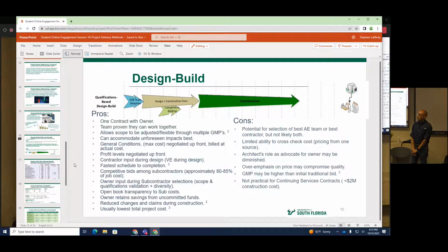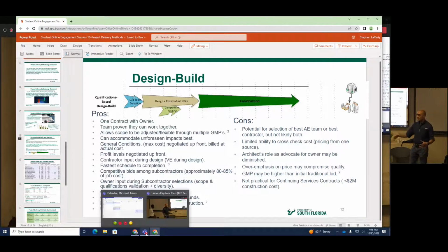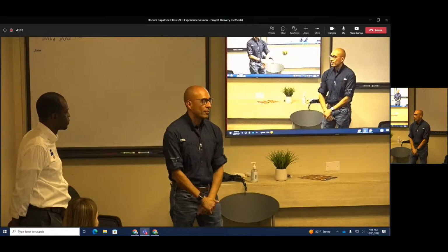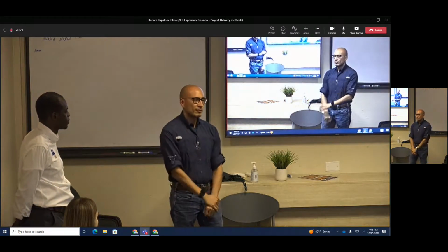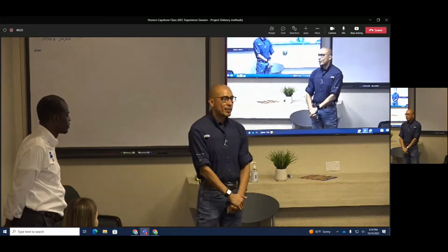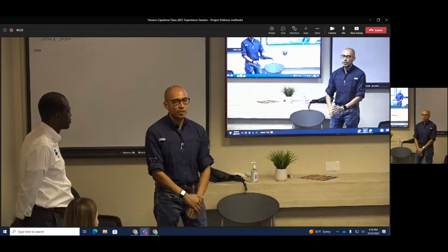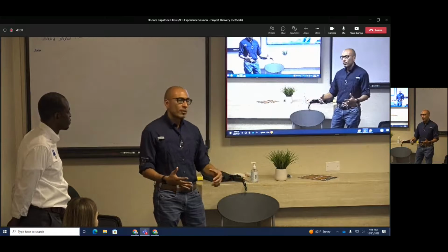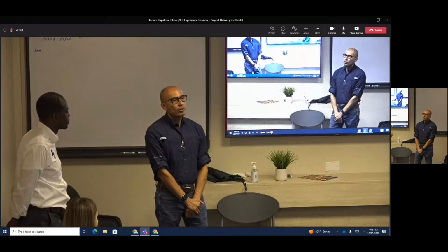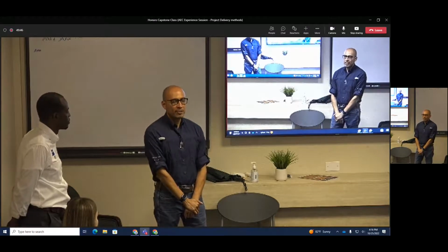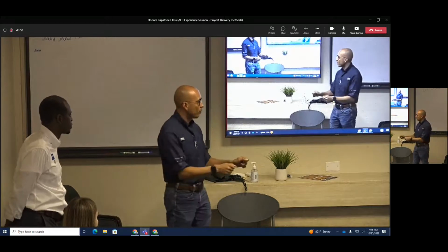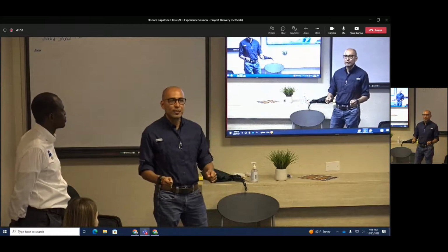Well, if Steve had a contract, the architect is responsible to coordinate that whole effort, right? And the architect gives us the instructions and we go and do exactly what the architect wants. If there's something missing, which there's a couple of things missing at Honors in terms of low voltage, which is fire alarm, Wi-Fi, DAS, right? It's hard to capture all those things on a drawing, so there are always aspects that are missing. When those come up, we go through an exercise of let's document what's missing, let's get approval, and then we'll proceed and do the work, right?